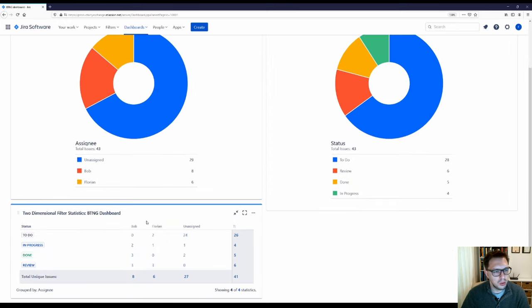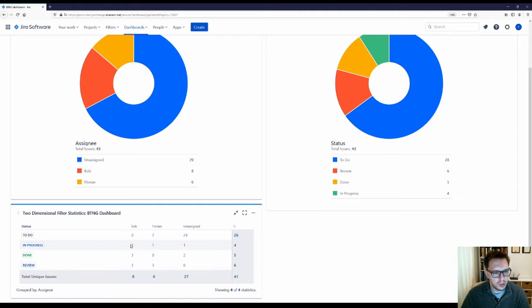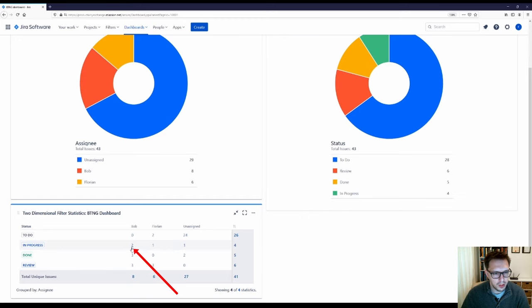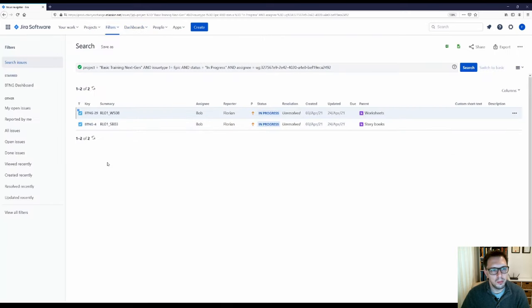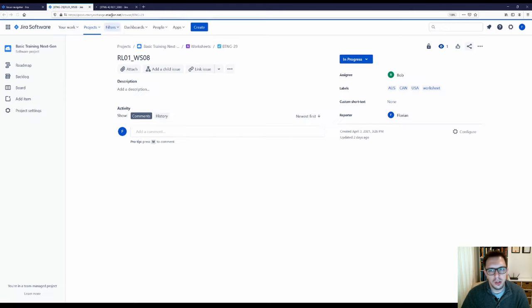I also like this two-dimensional filter because it shows me what status items are in, as well as who is assigned to them. Say I just want to see all of the in-progress items with Bob — I can just click on the number two, and that will open a filter search result with just those items, so I can then navigate to those items and action them.